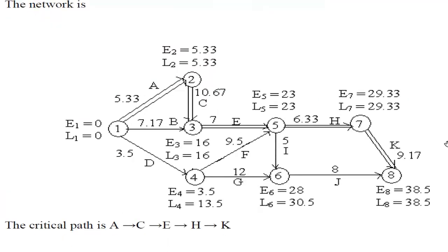Okay, I'm just seeing where it comes to be 0. Then we can use a network diagram to see what is the earliest time and what is the latest finishing time and so on and so forth. From the table we just finish it. From here we can show the critical path, and yes, the critical path has to be shown with double arrows, which I have not shown in the above example, which I should have shown: A to C double arrow, then 2 to 3, 3 to 5, 5 to 7, and 7 to 8. So using the double arrows or bold, you have to bold the arrow itself.